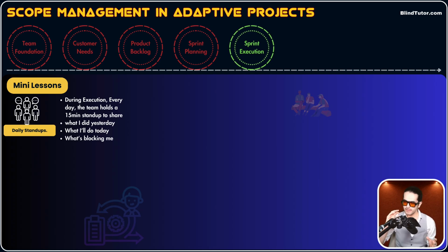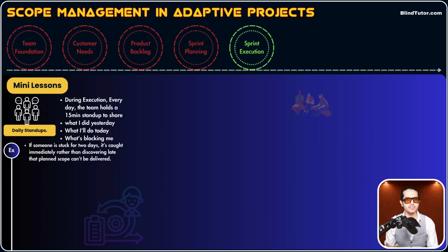Guys, the number one benefit is accountability. For example, if someone is stuck for 2 days, it is caught immediately rather than discovering late that the planned scope can't be delivered. So we catch those lazy development teams early because we're meeting every day. There should be progress, because the statements of what did I do yesterday, what will I do today, and what is blocking me need to change every day. If it is not changing, something is wrong. Somebody is working from home and is not working, chilling. So you can nurture the accountability.